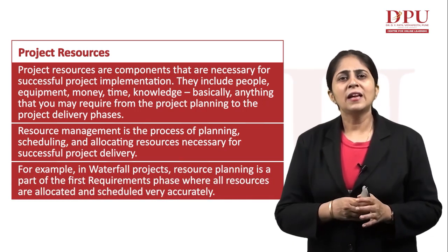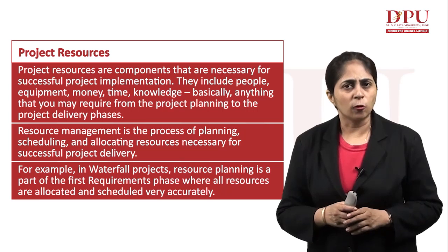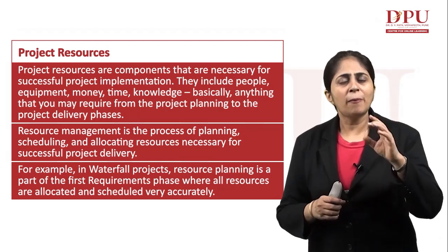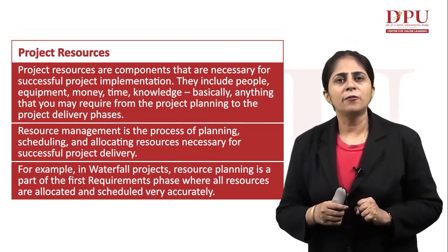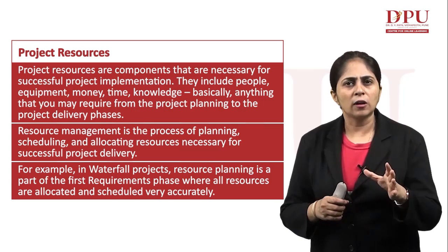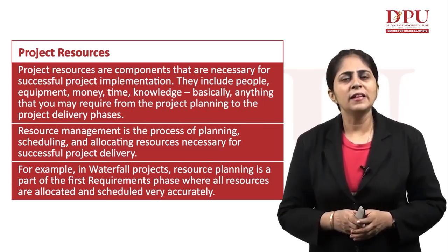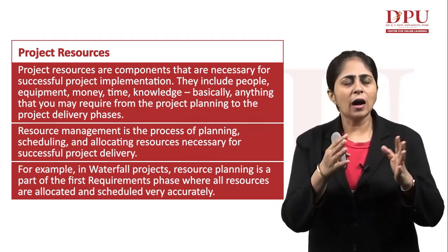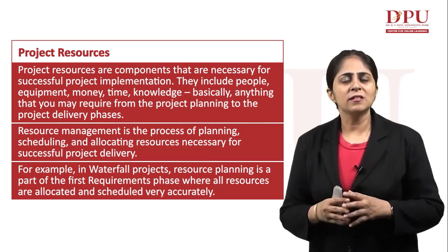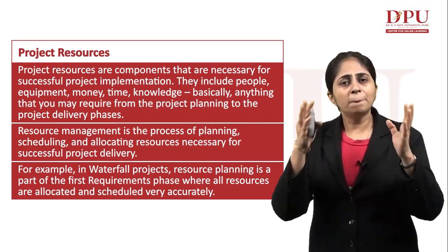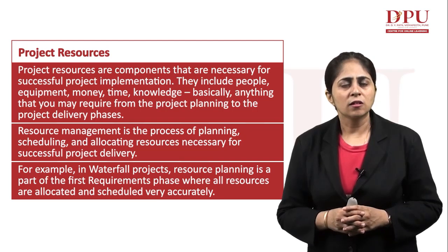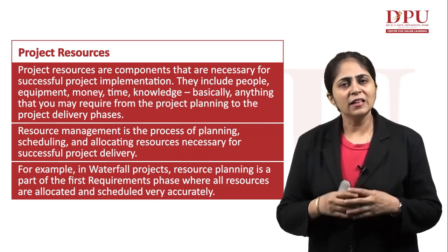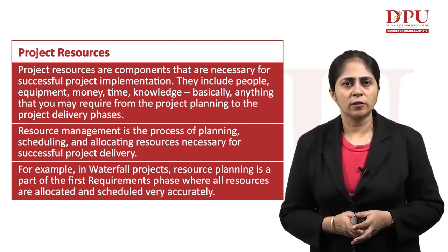For example, we have the waterfall methodology. In a waterfall project, resource planning is a part of the first requirement phase, where all the resources are allocated and scheduled very accurately. That means if we are following the waterfall methodology for our system, the very first thing that we require is to plan all the resources. So within the very first phase, this process of resource planning takes place in the waterfall project.